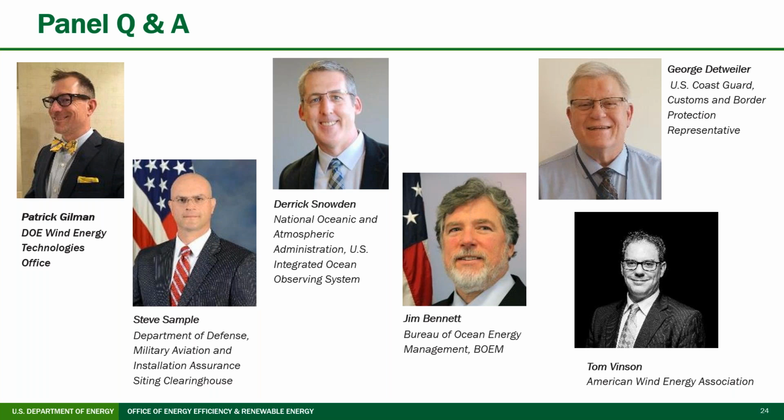So DoD works with BOEM and developers early on, as informally as we can, and then as things become more formal, we start to document things a bit differently. When BOEM is looking at its areas early on, they consult with DoD, where we look at what potential concerns would be in different areas, and they're able to build those into the plans that they make available for developers.